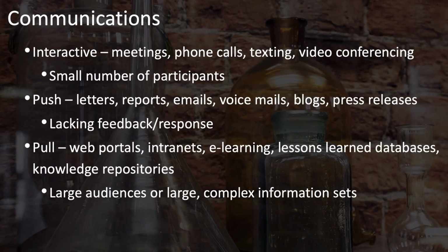Here is another dimension of communications to consider. Communications can be interactive, push, or pull, and these each have their advantages and disadvantages. Interactive communications are, of course, those in which you interact with people directly. This is in meetings, on phone calls, even texting or video conferencing. These kinds of interactions are best with a small number of participants and don't work as well with larger groups because it's harder for large groups to interact in the same way.